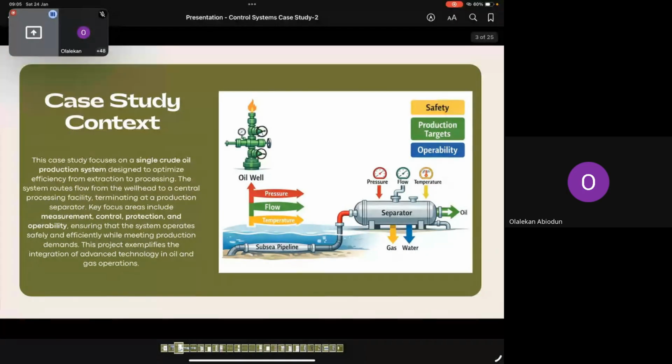The root cause of this restiveness might not disappear in another 2 or 3 years, right? You don't want to procure materials and just keep them in the store, hoping that restiveness will go. That means you are just keeping money in materials in the warehouse for 3 years.